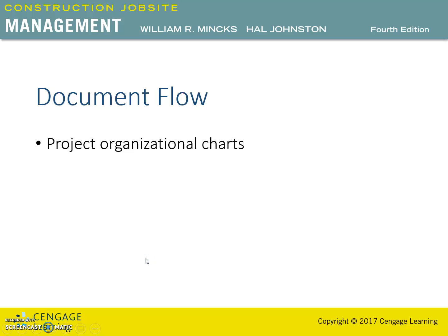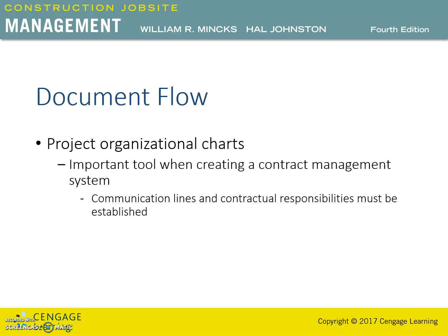Now let's talk about the document flow. Project organizational charts are an important tool when creating a contract management system. Communication lines as well as contractual responsibilities must be established. So the paperwork flow, whether through the office or the job site, should be established and entered into the project software.